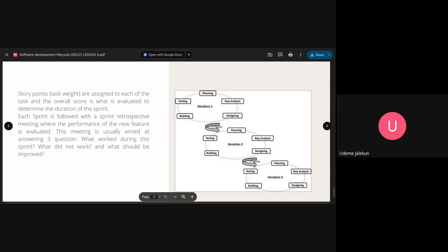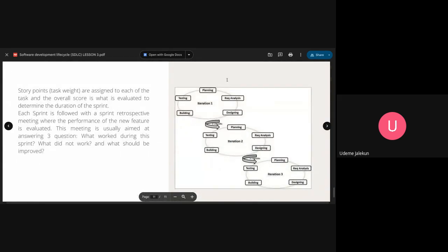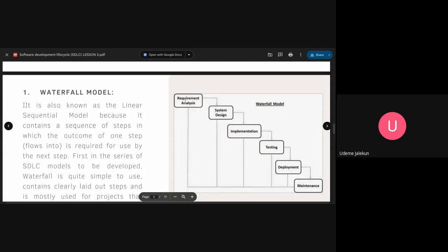Wow, so I can create an account, I can log in, I can view profiles, I can book. While you are still jubilating, the team has started working on the next feature, maybe payments, how to make an order and pay for the nanny. So that's how iteration works. That's how agile works. Small developments: work, do one feature, push; the next feature, work, push; like that. That's agile. Waterfall is saying finish everything, all 5 features, test everything before you push.